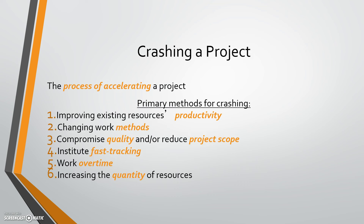The last thing I want to talk about is accelerating or crashing a project. Do I recommend this? No. Is it realistic? Yes. Say your customer needs the software two weeks earlier than originally agreed. You can improve existing resources, which increases productivity. You can change work methods, or compromise quality and reduce scope — do less or do it not as well, which is definitely bad. You can institute fast tracking, work overtime, or add additional resources — overtime being the same resources working more, where adding resources means bringing in additional people to the project.